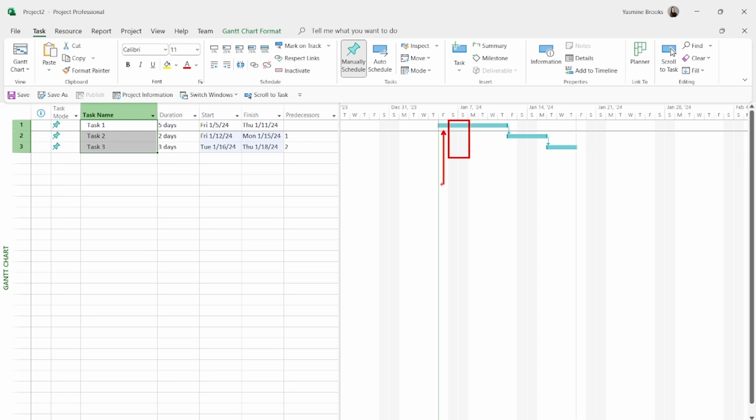So it's starting on Friday today. And then I have Monday, Tuesday, Wednesday, Thursday. And that's why this task is scheduled to be completed on January 11. Notice that it's not considering the weekends here as working days. Okay, we're going to discuss that later on as we progress with the class. But I'm going to keep doing things here.